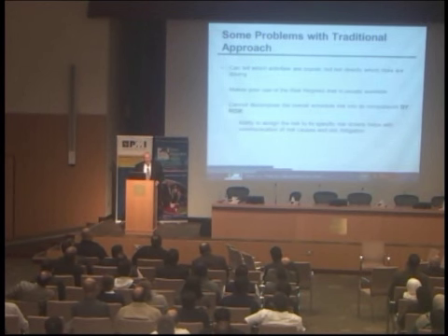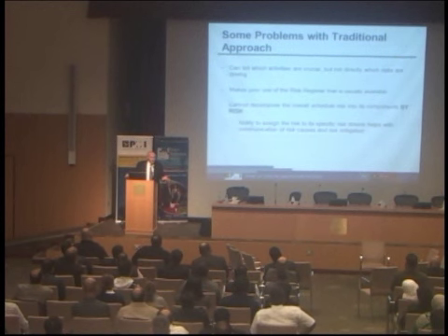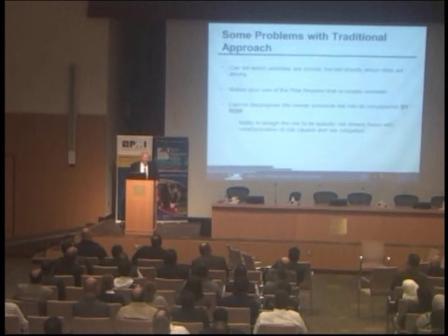Trying to get the criticality index, which means which activities and paths were on the critical path in most of the iterations during the simulation. So we ended up saying that an activity is very likely to be on the critical path. That does not say what risk is important. And we don't mitigate activities. We don't mitigate paths. What are you going to do? Not do the activity? Is that your mitigation plan? This activity is critical, so I'm just not going to do it. No, we don't do that.